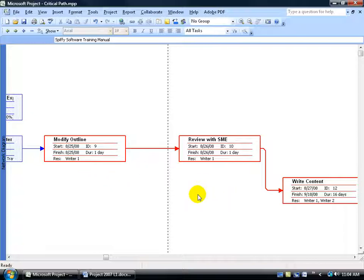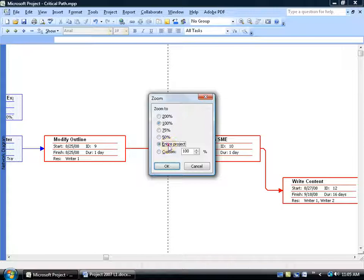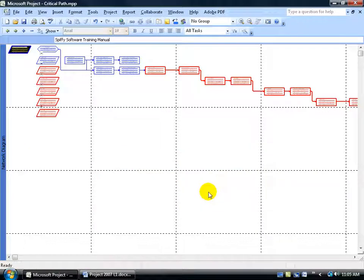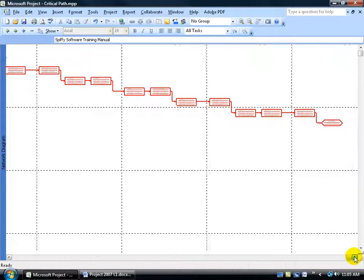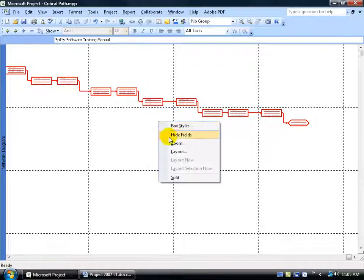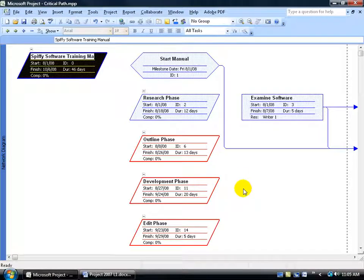Just like the Gantt chart, if you want to zoom out to see everything in the network diagram, you don't have a timeline to right-click on. Instead, right-click in a blank area and select Zoom. Say you want to see the entire project — click OK, and it can come close to fitting it. You can see how that flow works, but zooming out isn't probably your best friend. Right-click to zoom, set it to 100%, and click OK to get back to the details.